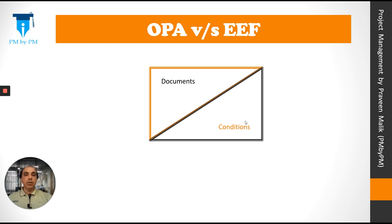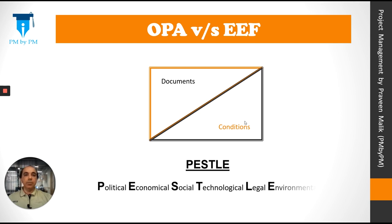So what is the key for distinguishing between OPA and EEF? OPAs are some sort of documents; EEFs are some sort of conditions. The condition may be within the organization or outside the organization. Documents are used by the projects and help the projects; conditions influence the project, sometimes negatively, sometimes positively. An easy way to remember the conditions is the acronym PESEL — political, economical, social, technological, legal, environmental. Just remember this: any document that you use for your project can be considered as OPA, and any condition that influences your project can be considered as EEF.